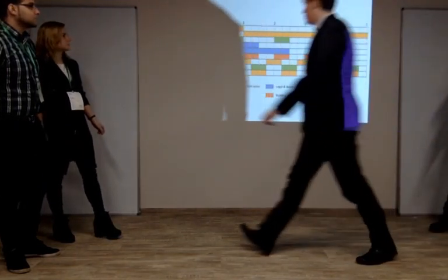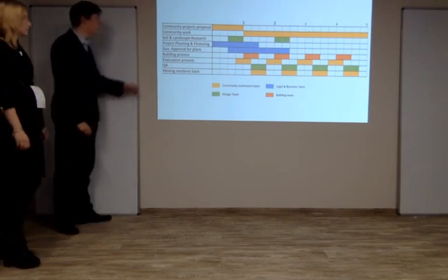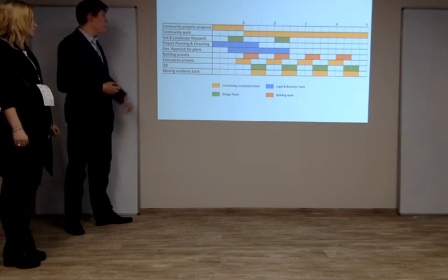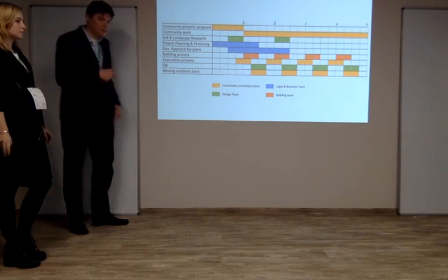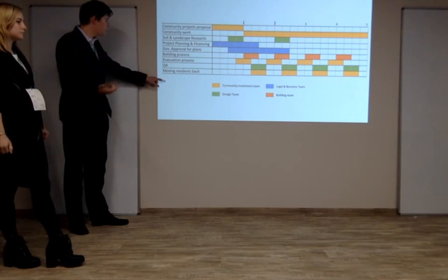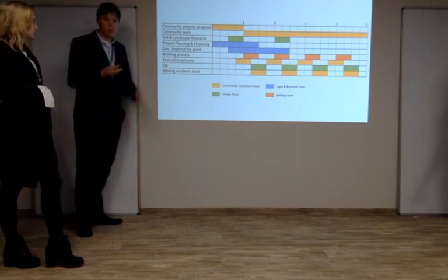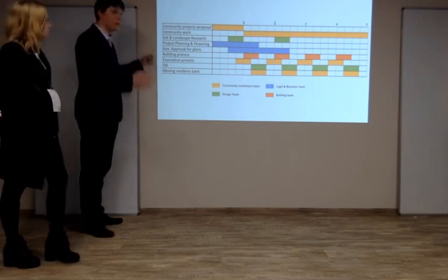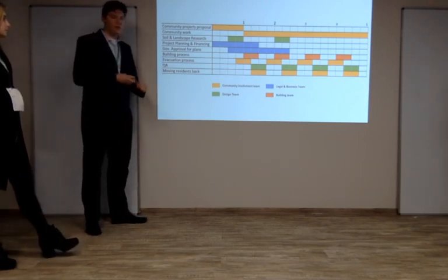All right, so we decided our plan will take about 5 years. In the first year, we're going to be researching the soil and area. After that, we're going to go with the evacuation and relocation, project implementing, and moving the evacuated people back to their homes. These three will take place almost intermittently, which means we will first evacuate a group of people. After, we will reallocate them into living modules.